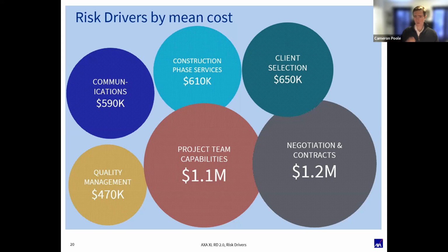First thing we do again, we'll look at your contract. I see that you signed a contract that commits you to the highest standard of care. Even worse, right? You sign a contract that says you will deliver error-free or defect-free design documents. Well, now our attorneys don't just have to prove that you performed to the level that another architect would practicing in the same or similar locality. We have to prove that you performed to the quote unquote highest level, or that you performed error-free, or that you performed to that nationally recognized level.